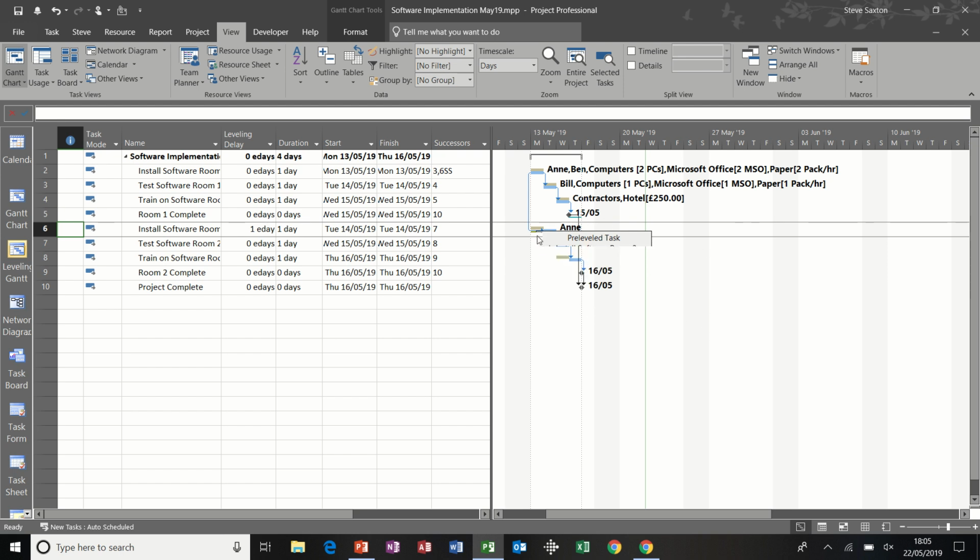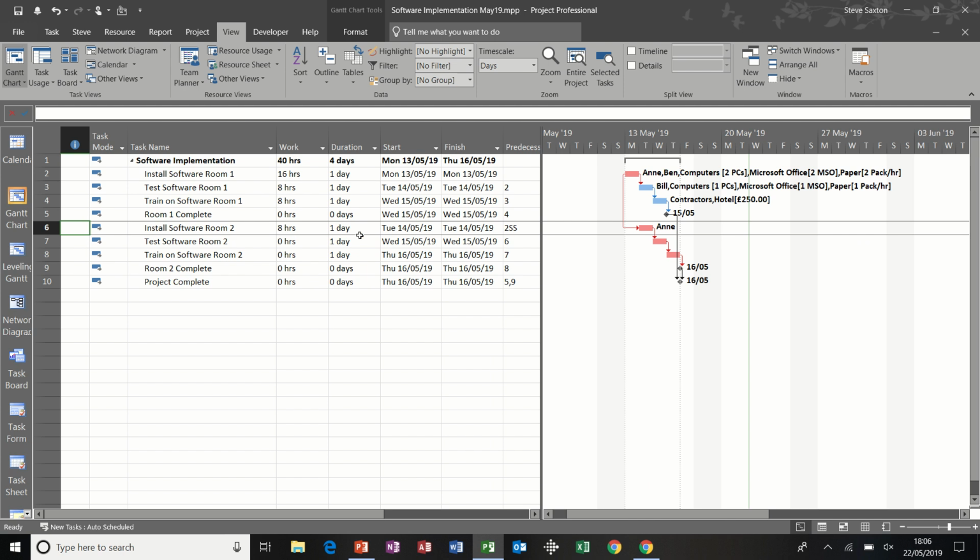And you can see there's a little arrow there where it's showing, if I can just point to that, slack, so it's moved one day forward. Once you've identified that, you can put it back to the normal Gantt chart. Before I do that though, I'll just point out there it says one elapsed day there, so you can see which one's moved, and obviously that's because it's all linked together. You've got a cascading movement on the rest of these tasks. So I'll put that back to the normal Gantt chart, so we're back as we were.